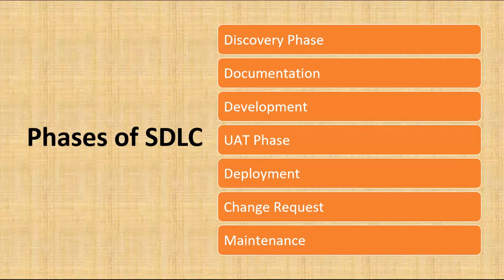So you need to determine the potential of the automation process using your RPA tools, and you need to identify whether a process is the right fit for automation. In this discovery phase, usually we do identification of the processes, prioritization of the processes, and estimation of the processes, and we create draft versions of the documents, like the as-is process map and the to-be process map.